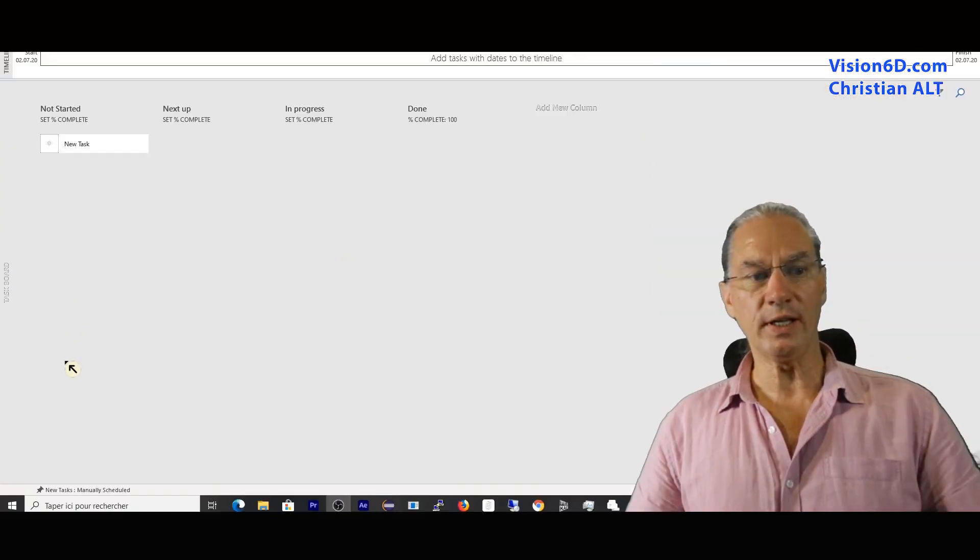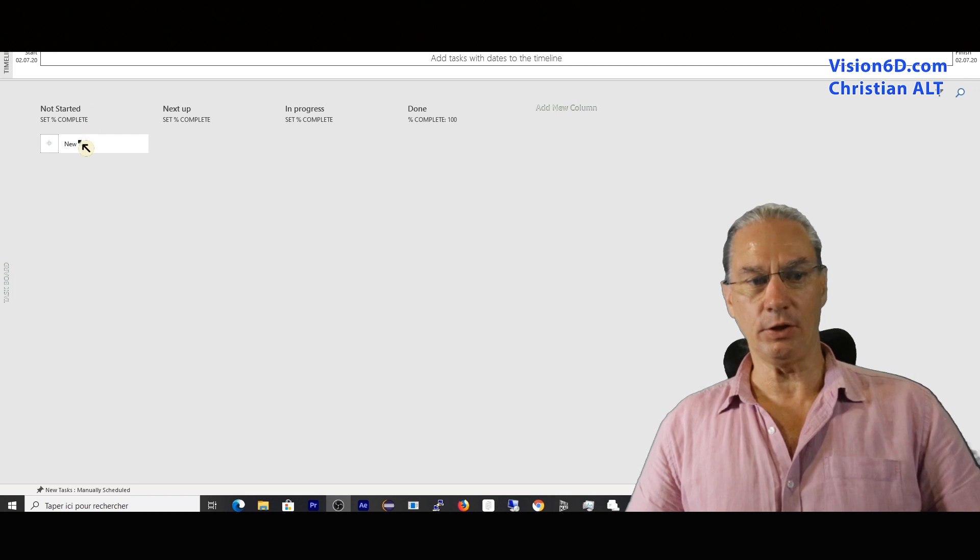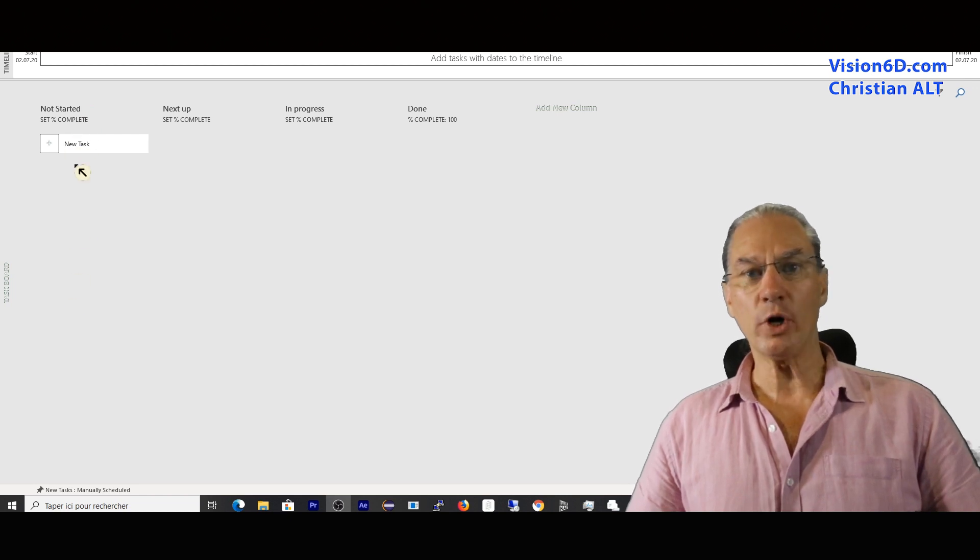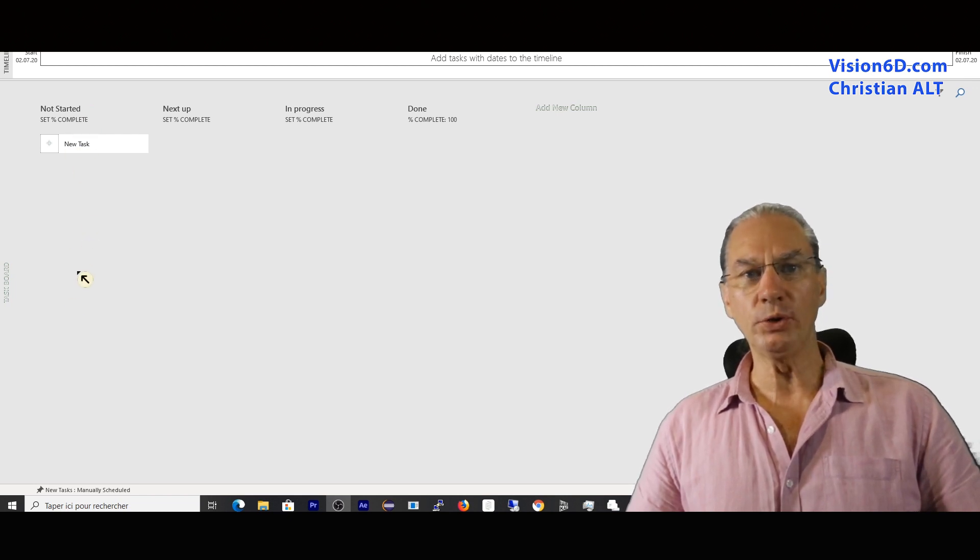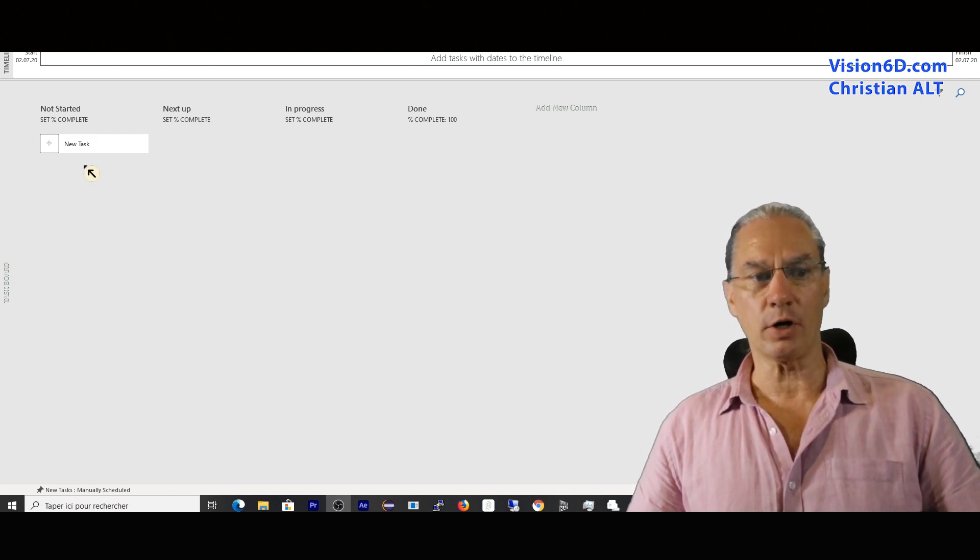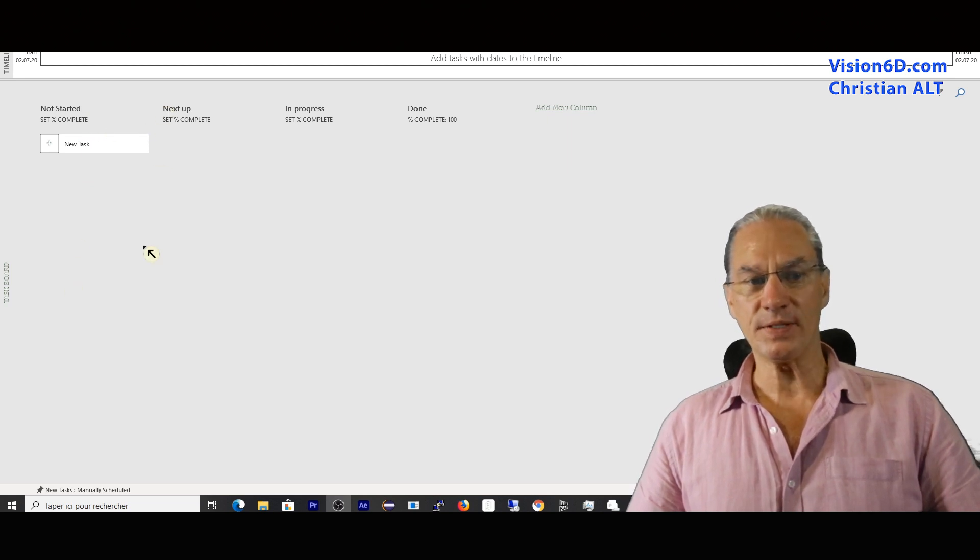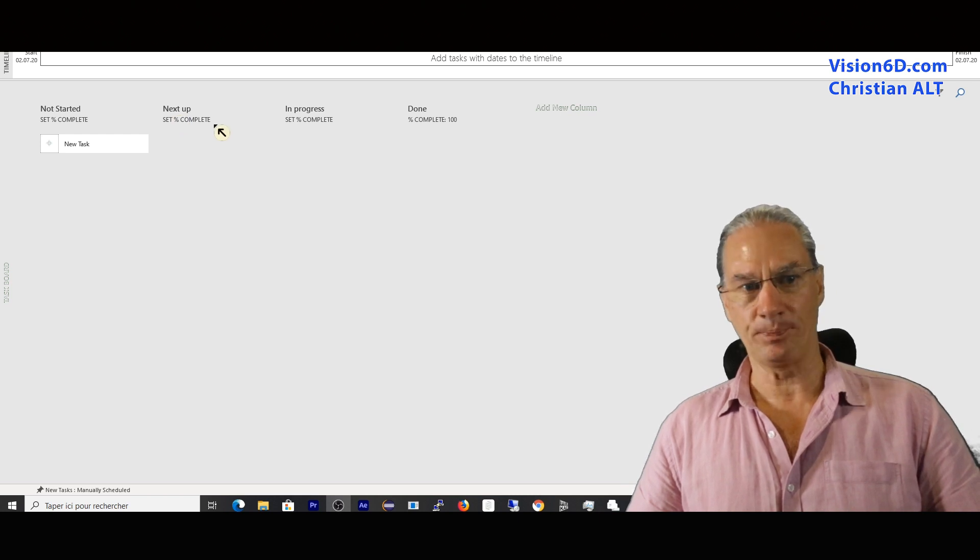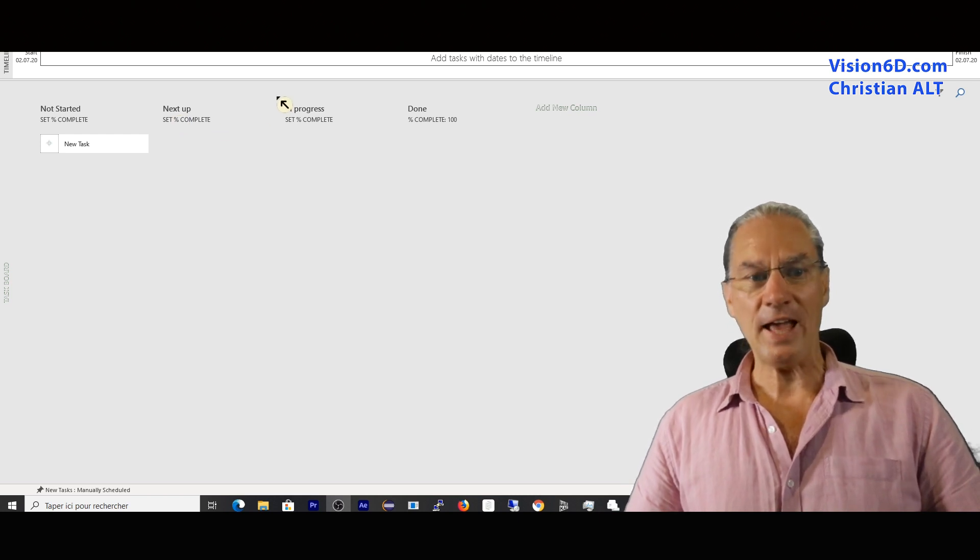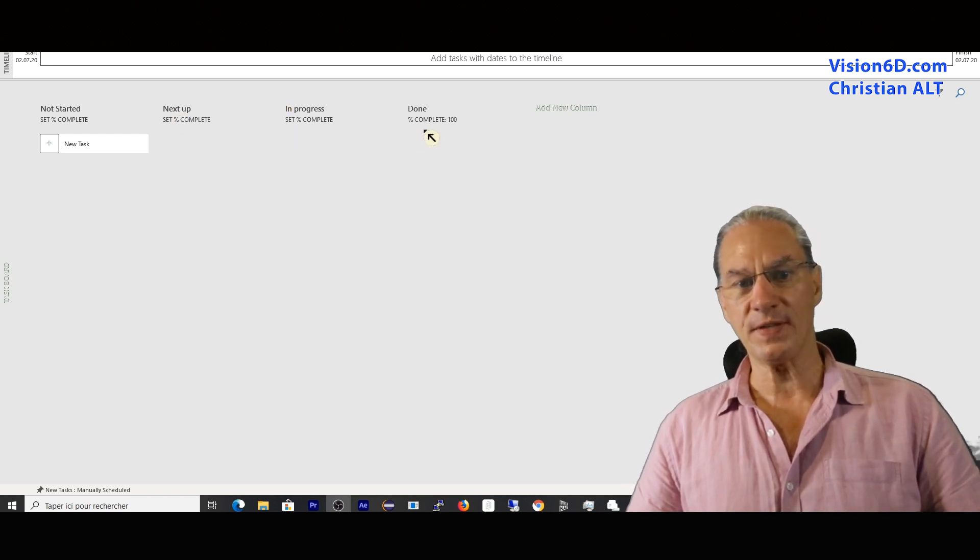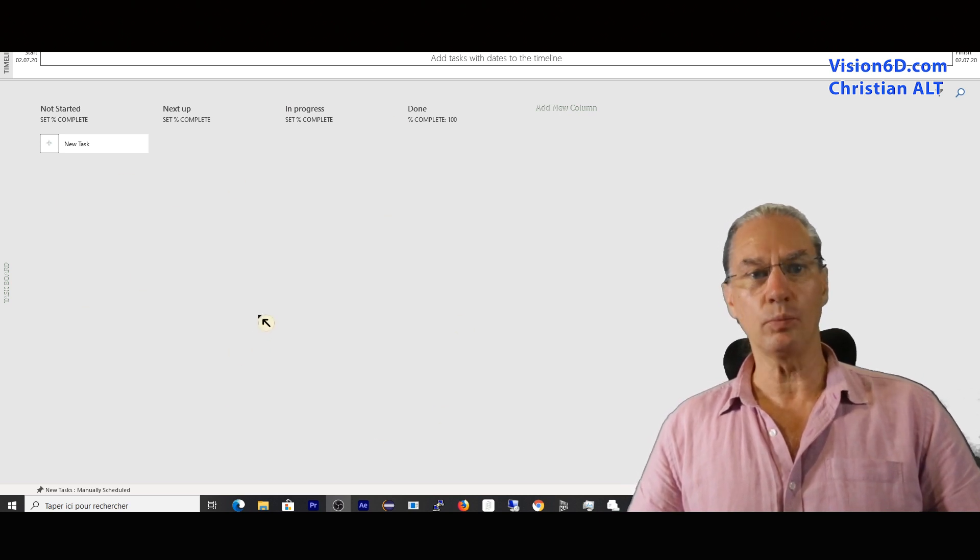You see that we have different columns. We have here not started - it's where we put the tasks which are part of the backlog. Then there is the second column, which is the next up. And after we have in progress, and then done. This is really a basic Kanban board.